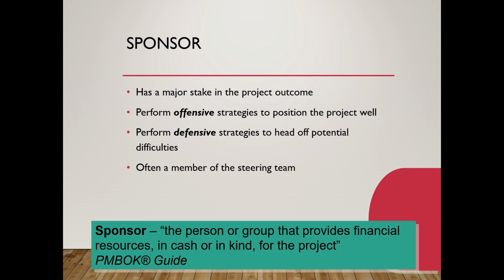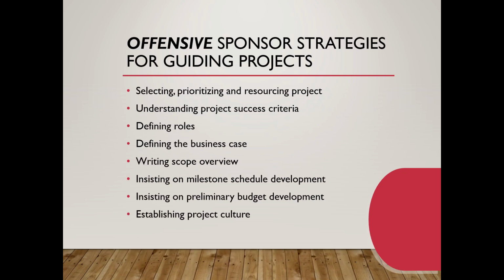This is about the sponsor, and as we already discussed, the sponsor has a major stake in a project outcome, and he may perform offensive or defensive strategies in a project. Offensive strategy is to position the project well, whereas defensive strategies ward off all the potential difficulties. The sponsor might often be a member of the steering team. Offensive strategies: writing scope overview, defining roles, the basic things like selecting, prioritizing, and resourcing the project, establishing project culture, etc.